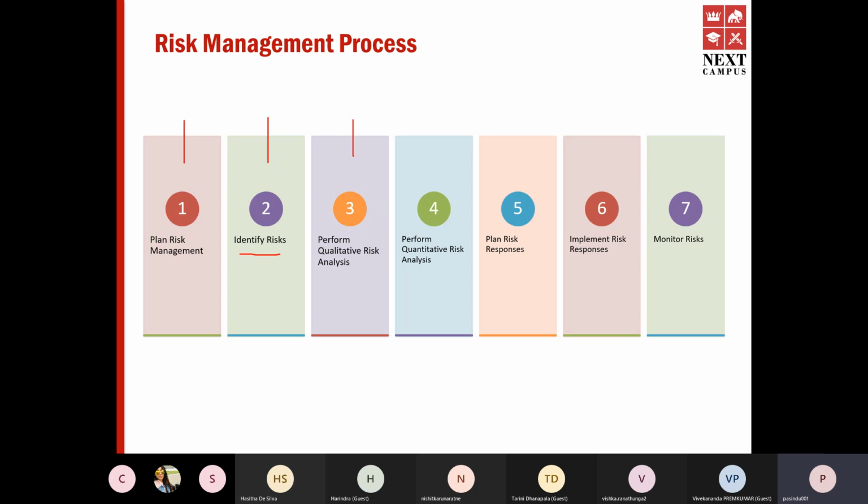You would monitor it and let it be, because the first thing about a risk is that it's an uncertain event. It has not materialized. A low risk has either a very low probability or a very low impact. If it has a very low probability, you don't need to worry too much. If it has a very low impact, again, you don't need to worry too much. So maybe low risks you would not manage; you would accept them completely.